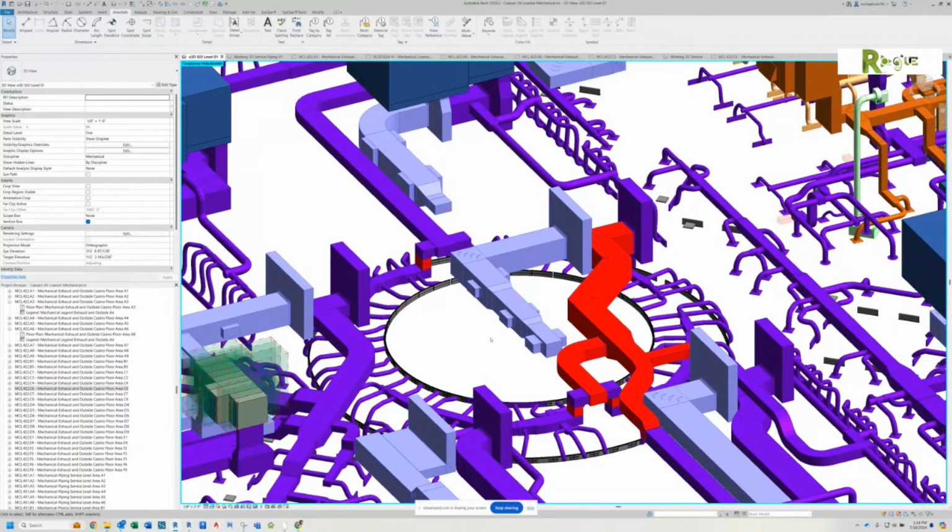And that's what I wanted to confirm with you, because right now it's set up as a confirming RFI. I want to release Spencer Hoffman to get to fabricating those diffusers as we've got them. Are we prepared to do that, or should we give the confirming RFI time for the architects and the engineers to approve it? Are you following what my question is? Yeah, I'm following. I'm just looking at everything in red there.